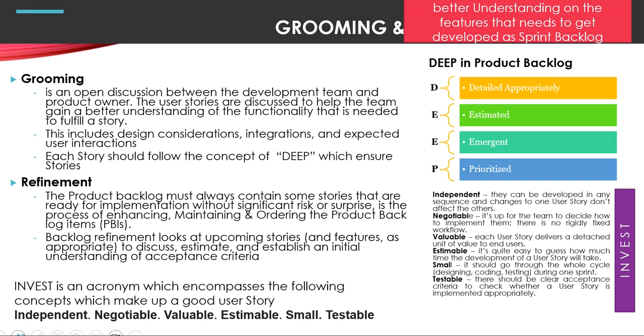So it's very important to have a grooming session continuously over a period of time, and it generally takes 10% of the time of your entire sprint. But it need not be restricted, even if you go over the time for grooming sessions. In a grooming session, the product owner and the development team collaborate regularly to groom their product backlog items or sprint.